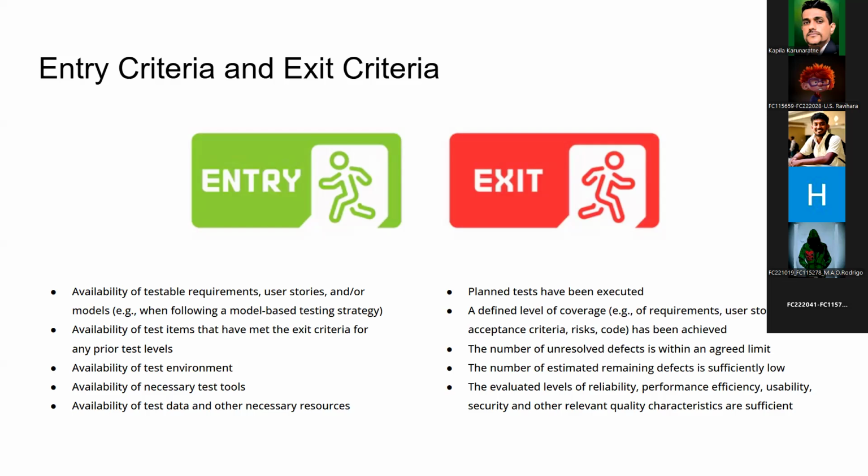Now think you executed all the test cases, but out of 100 test cases, 20 failed and there are open defects. Then your pass rate will be 80%, because out of 100, only 80 test cases passed. But you have defined you need a 95% pass rate. So you can say my 95% pass rate is not achieved. Because of that, the remaining defects need to be fixed by the development team, and I have to re-execute, do the regression testing and complete my execution until it reaches 95%. Right? Something like that.